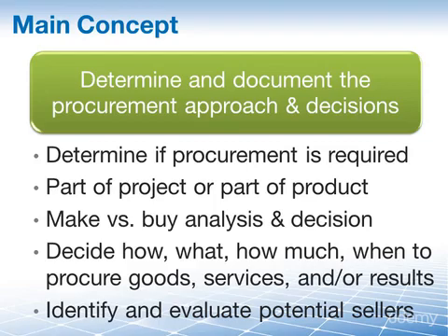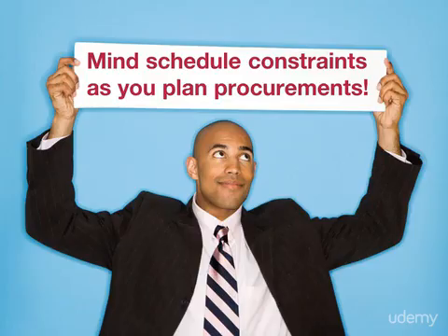There is a lot to do to plan your procurements, so your planning effort is commensurate and tied to cost and time available to deliver the project, which brings us to a related point. It is important that you mind schedule constraints as you plan procurements. Your schedule is a major consideration when creating the procurement management plan and figuring out your approach to procurement, as schedule constraints can affect every procurement management process.